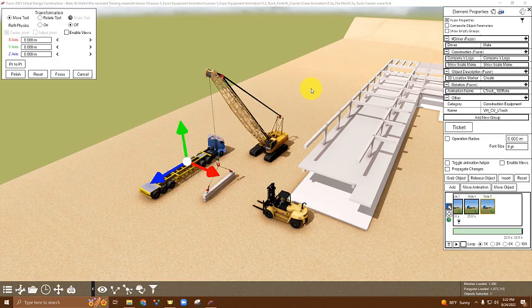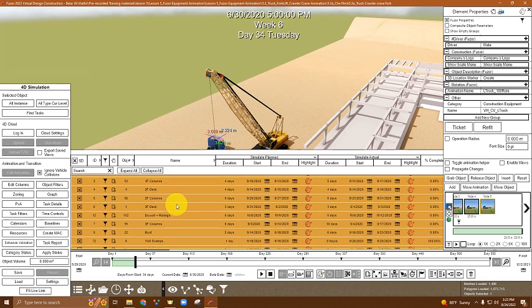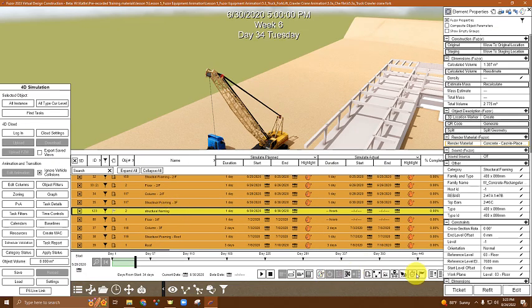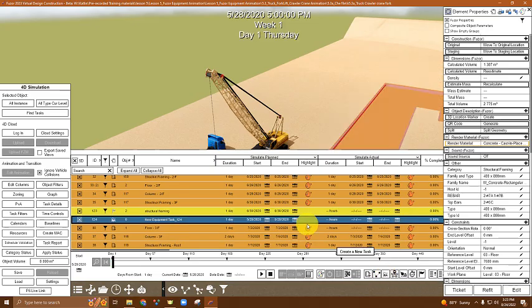Our last step is to create an equipment task to put our vehicle animations into. It is possible to put each vehicle animation in a different equipment task and set them at different times, but then it would be necessary to adjust both for the duration of the equipment task and the durations of the animation in making sure they sync up. For this situation, one equipment task will be more simple. We're going to find our staging task and our construction task, highlight it so that when we create a new equipment task, it will appear directly underneath instead of going to the bottom of our schedule.